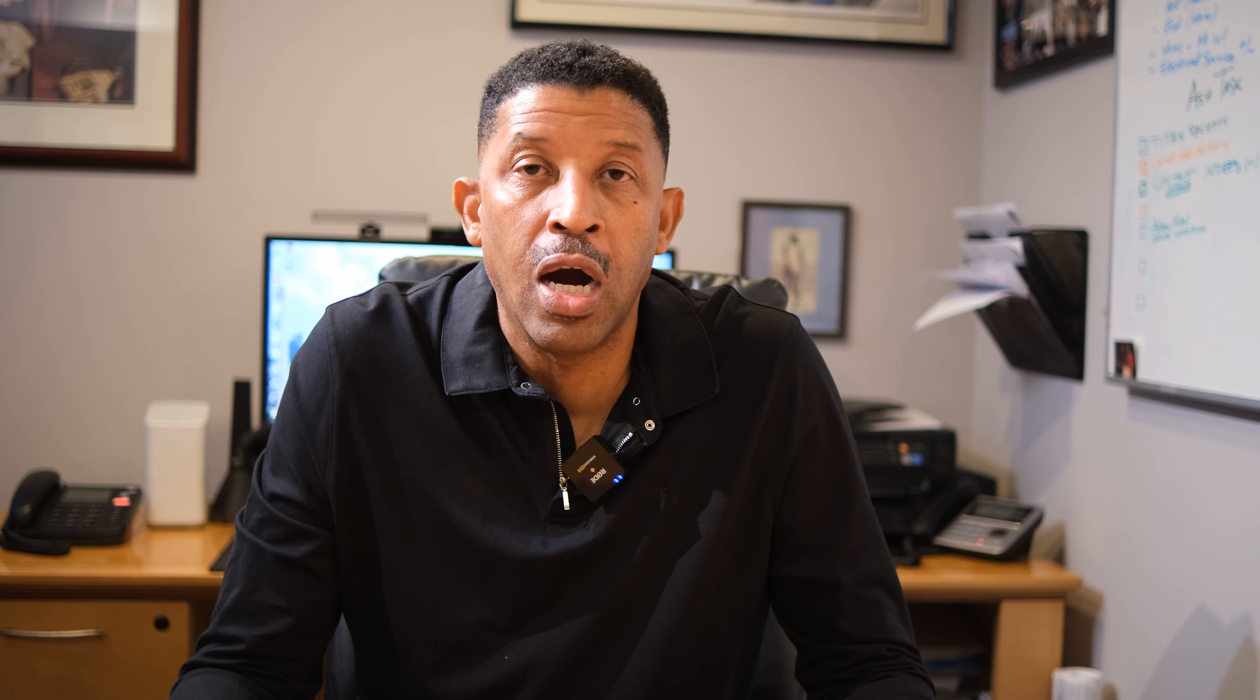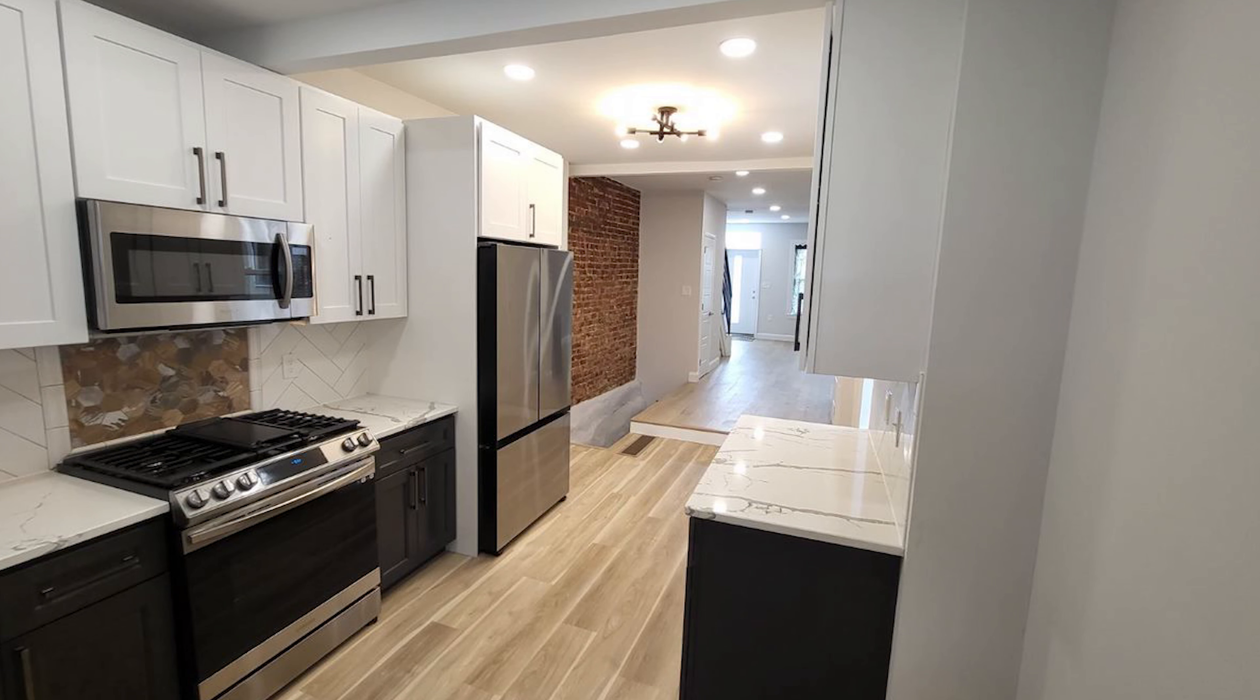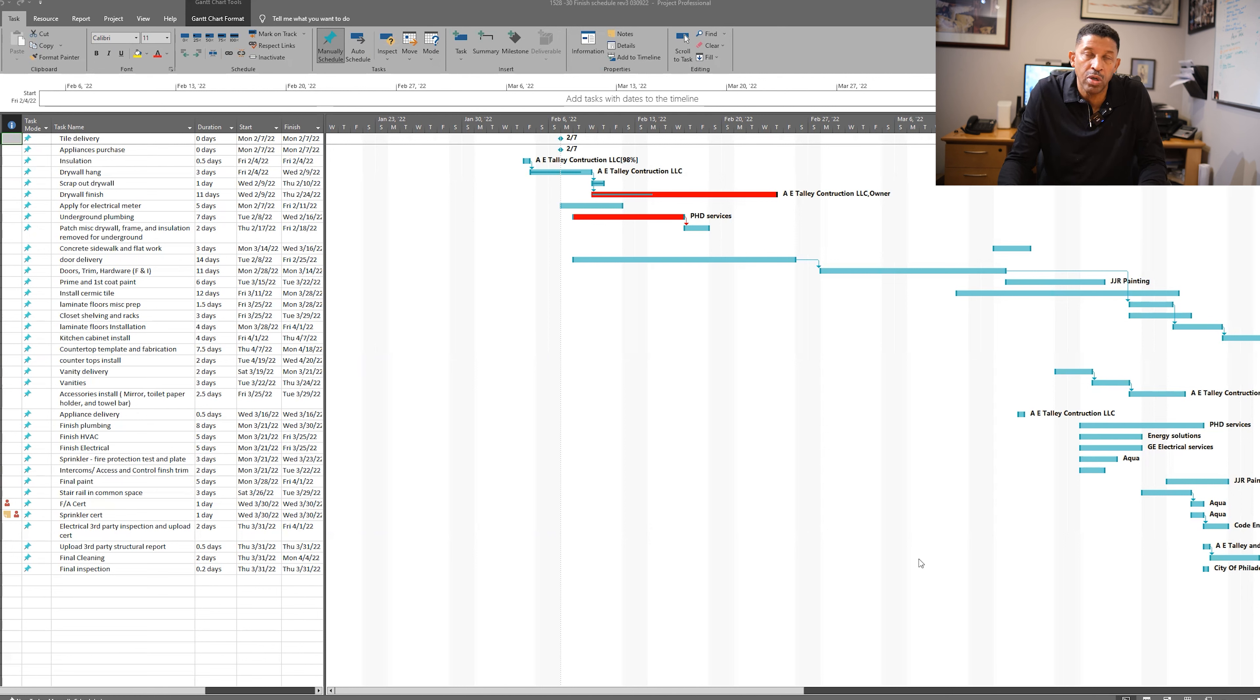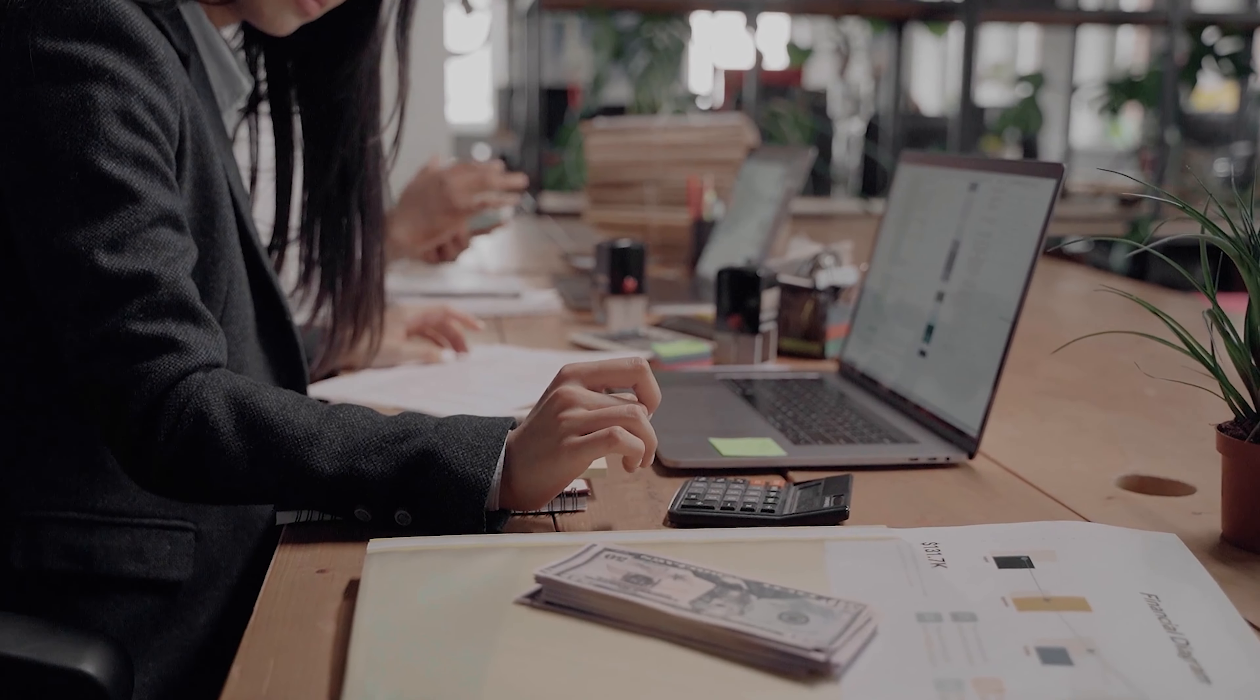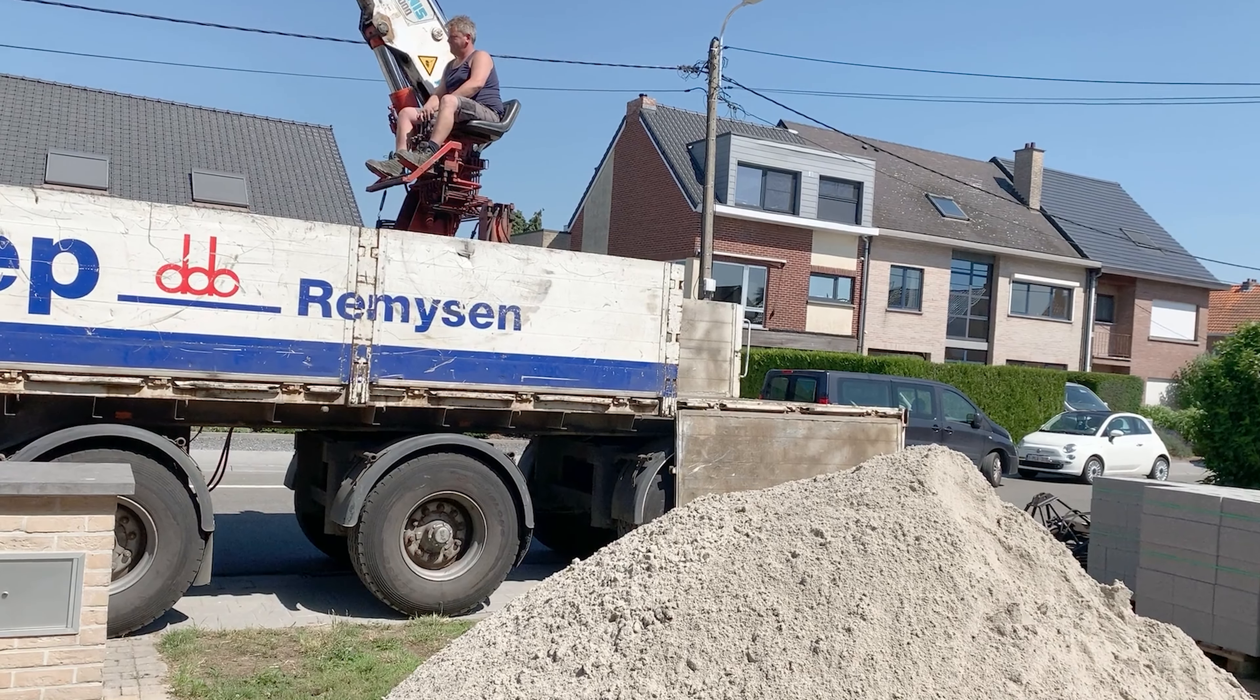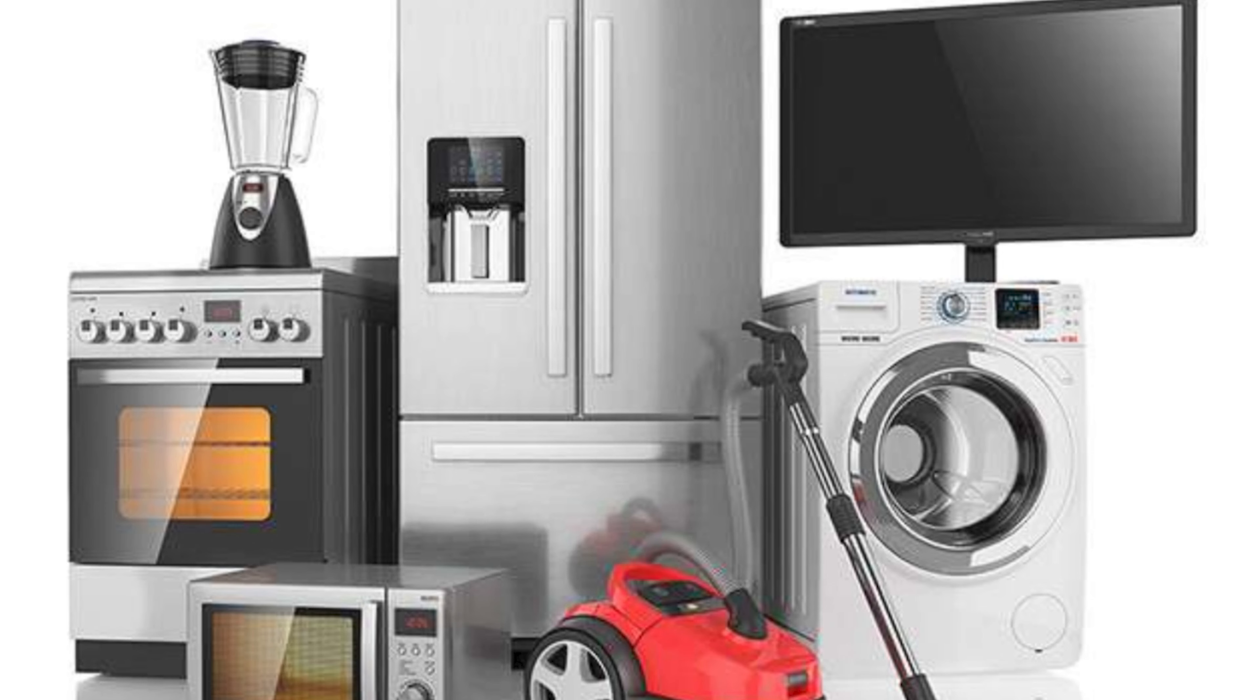But let's talk a little bit about scheduling. When we're doing a project, whether it be a multifamily project, a commercial fit out, or a regular mom and pop kitchen or bath, we do what you call a Gantt chart schedule. And that Gantt chart schedule has everything on the schedule. It tells you when material, which tells you when we're going to start the job. It tells you when the homeowner or property owner is supposed to give you the initial deposit. It shows you when the inspectors are going to come. It shows you when material is going to come. It shows you when appliances are due. It shows everything about the job that needs to be known so that we can stay on task and stay on schedule.